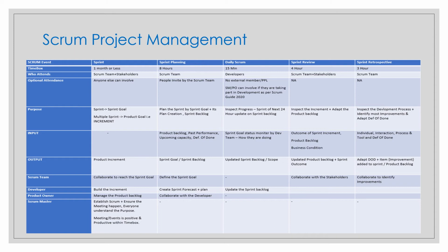And during this meeting, the development team makes a live demonstration. It is not just a representation or a presentation in a PPT. It should be a live demonstration of the product backlog items they have done, which is actually the highlight of this meeting. It is particularly valuable for the stakeholders to try out the product hands-on in order to get a better understanding of what has been built. And the development team also discusses what went well, what problems they have encountered, and how to solve them.